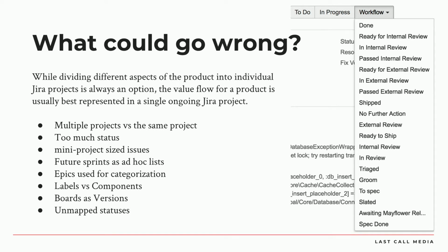When you create the project, if you go into advanced or more settings as you're creating it, you can choose to share a configuration. And that's beneficial because then if you have a shared configuration across a number of projects, you can improve that shared configuration over time. You can iterate on your own configuration rather than having one-off configurations for every project.